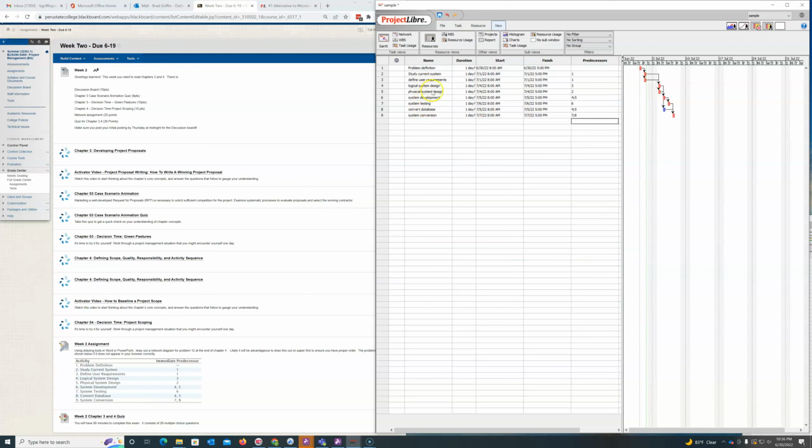And in fact, if we were to put a different duration in there, so if we said that was actually going to take 15 days, you can see how it spreads that out significantly. Now, again, with no durations in there, this is a little artificial. Put it back to 1 day. But what you do see is we talk about something called that critical path. And in here, everything that's in red is going to be on that critical path.